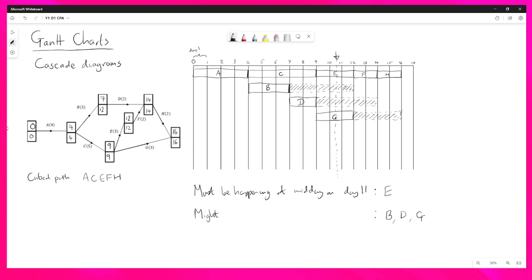So although the Gantt chart might tell you that, yes, you can complete the project in this time, the number of workers on, say, day 8, because of all of the activities that must be happening on that day, is, say, 10 workers. Well, that's going to delay the project because you don't have 10 workers. So that's the extension for the second year, but that's in another video.